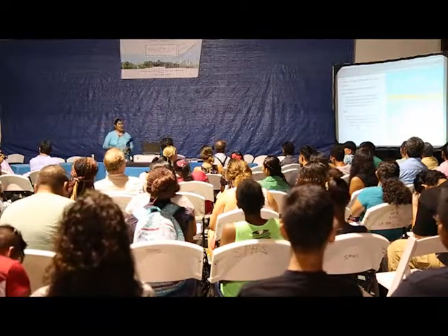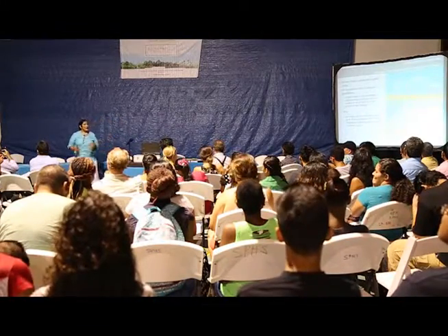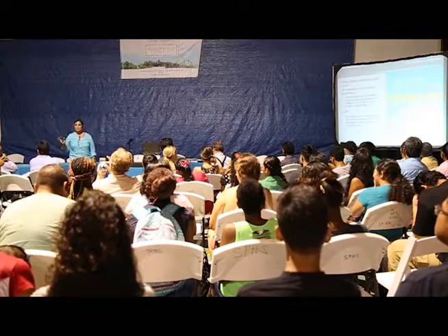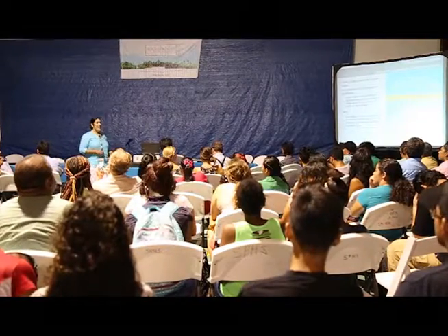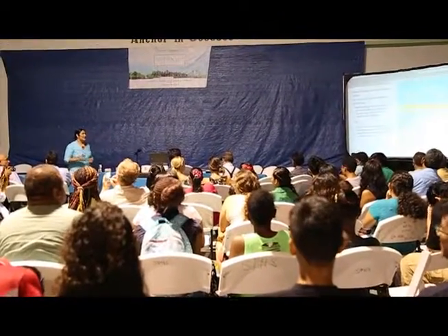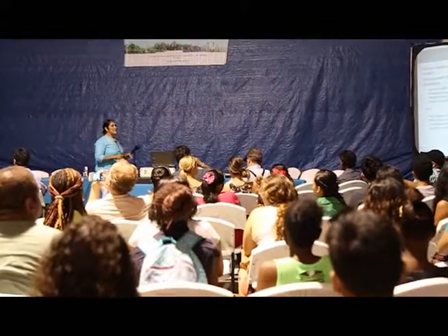Again, there are 7 guest pavilions on each coast as required in the overwater guidelines. We're not breaking any rules. We're following the guidelines of this country, which allows for this to occur. Again, there are clear guidelines in terms of the size of the structure for the maximum length of the seafront, which is a maximum of 20%, and again, we are in compliance. And the footprint of the overwater structure does not exceed the 20% of the developer's undeveloped property on the northern zone. So again, this investor believes in following every rule and every guideline and every law and gaining every permit required.